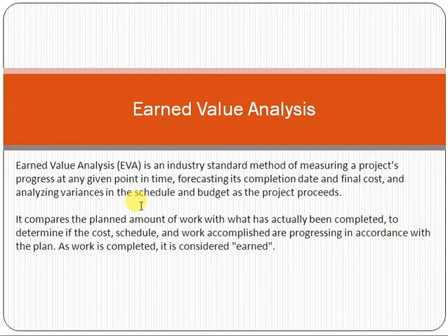Now friend, after 1 hour, you recognize that only 5 kilometers have been covered, because of very high traffic on the road. However, as per the plan, after 1 hour you should have completed 10 kilometers. So you are behind schedule, behind the planned work, and you must take some corrective action, otherwise you will not reach on time.